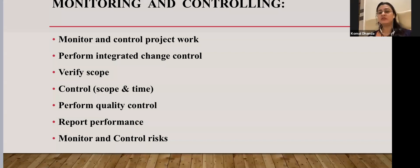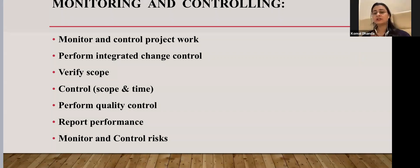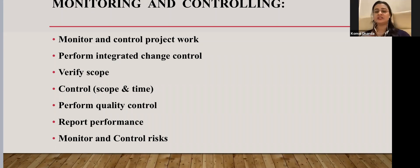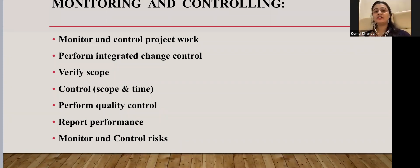Verifying scope is always focused on acceptance — ensuring the work, the quality of the work, and the depth and breadth of the work being done is focused for its acceptance. Because the ultimate aim of any project is to get accepted at the end. So this process validates that all deliverables of the project will meet the project requirements, defining the project's final acceptance.